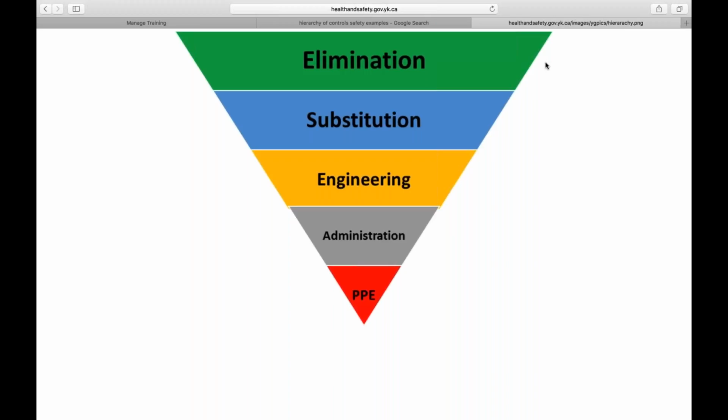Basically, what happens during that pre-bid is that it has to be done for every job. So if we're planning to do work on a refinery at Valero, let's say in St. Charles, we need to have a site plan, or at least enough of a site plan, ready for that pre-bid, and then continue finalizing as we get there, before employees are actually exposed to harm. If we're going to a manufacturing facility to do a build-out, we have to do the same thing there. They're all going to be specialized and tweaked to their particular environment.